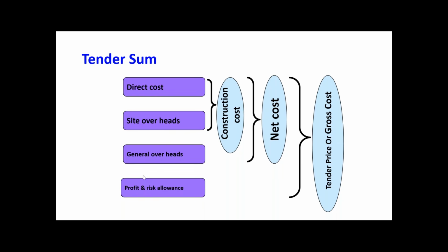Do you understand what I am telling, or shall I repeat? Okay, I will repeat once again. Take any project, you have the total site office and head office overhead and the profit margin, plus you have the direct cost. So you can have the percentage comparison, how much is the direct cost and how much is the total cost. So you must have the comparison: in this project, what percentage went for site office and profit, out of the total project.